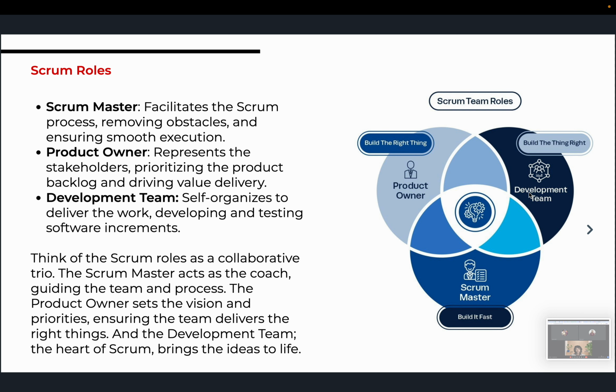So your product backlog items are managed by the product owner. So the product owner, his job is to maximize value for the Scrum team's work, right? So he also is in charge of that product backlog. Whatever decision he makes on that product backlog is the final decision. So he works in collaboration with the development team to ensure that everything is working fine, and the development team is working towards achieving the sprint goal and the product goal.